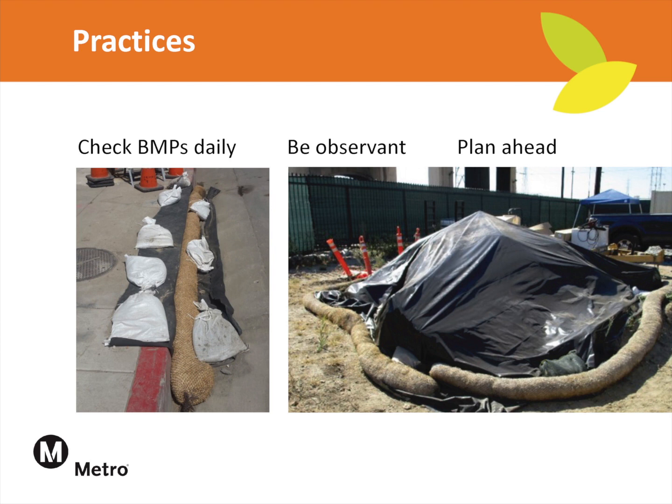As we often hear from the field, it is the little things that get a project cited. Therefore, daily maintenance of BMPs is critical to a successful project. Check for proper storage of rusty or greasy parts, use of containment and secondary containment, condition of fiber rolls used to protect inlets, effectiveness of track-out prevention measures, etc. If something is no longer working effectively, replace it immediately. If you see trash, or even if it is blown onto the site, collect and dispose of it properly so it doesn't become a problem for our project.